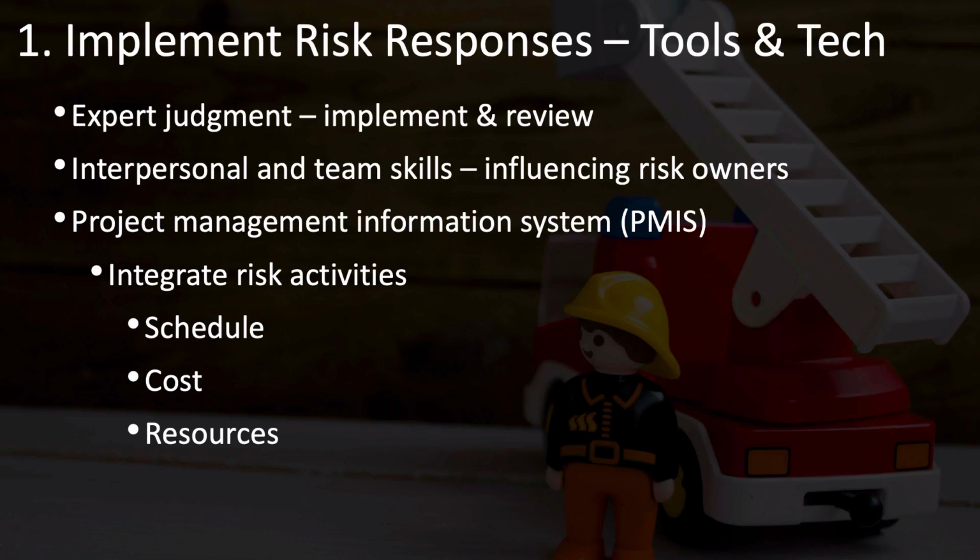The bottom line is that you need to follow up with your risk owners and make sure that they're taking care of their responsibilities. Your project management information system may also help you with this, and it can help you to integrate your risk activities, since activities will need to be added to your schedule, to your costs, and may also affect your resources as you identify certain resources that are needed in order to implement certain risk responses.